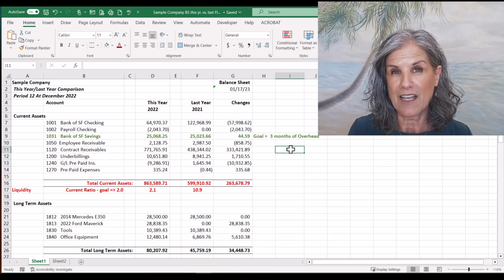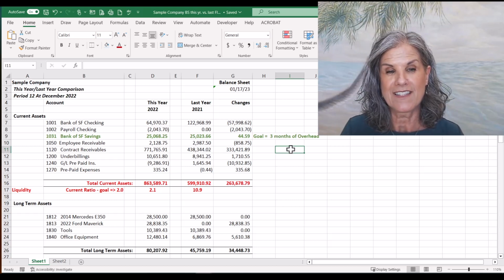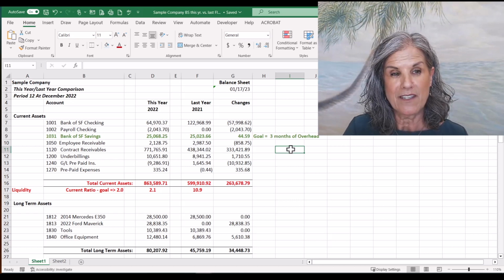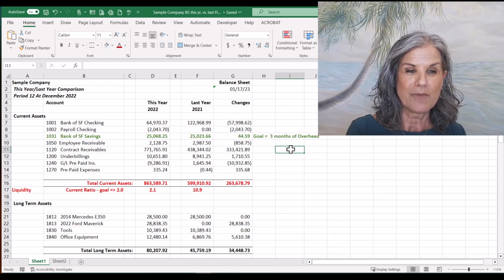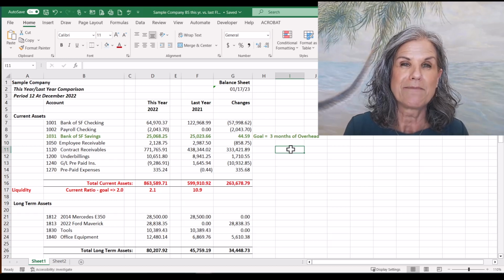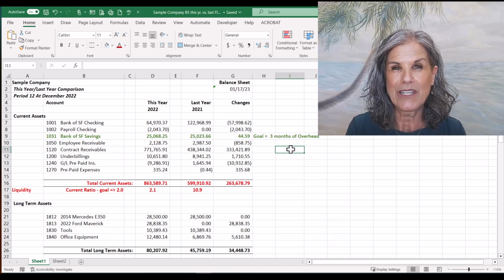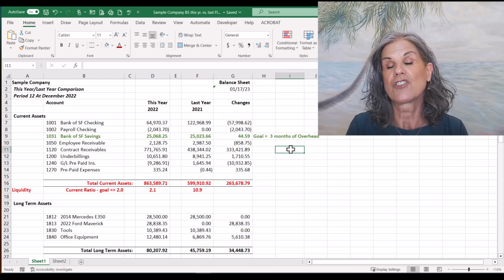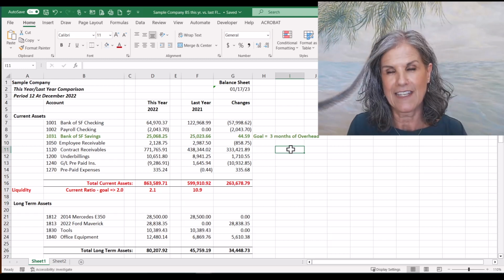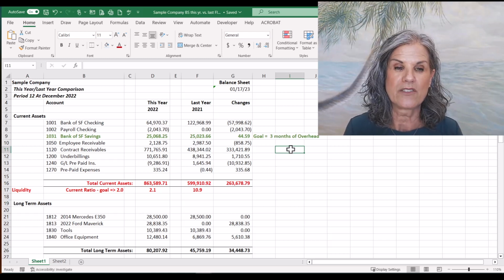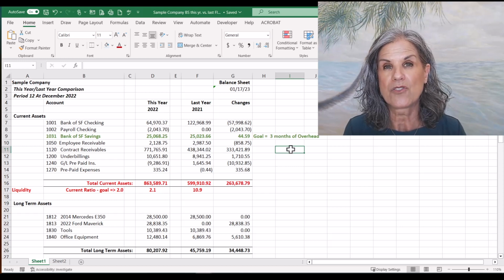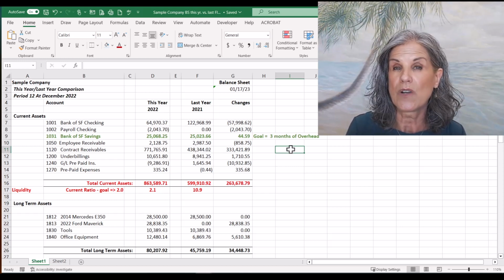It prompted a conversation with them where I said, hey, it might be good for you to take a look at that client relationship and let the client know, listen, I'm losing money on this money that we're floating for you. We need to charge you finance charges on it. And when they looked at the contract, their contract actually did have a clause for charging finance charges. And that's what they started to do, because when you're floating money for somebody else, it's costing you money, right? There's a lost opportunity cost in that. And there's also a higher risk in that.